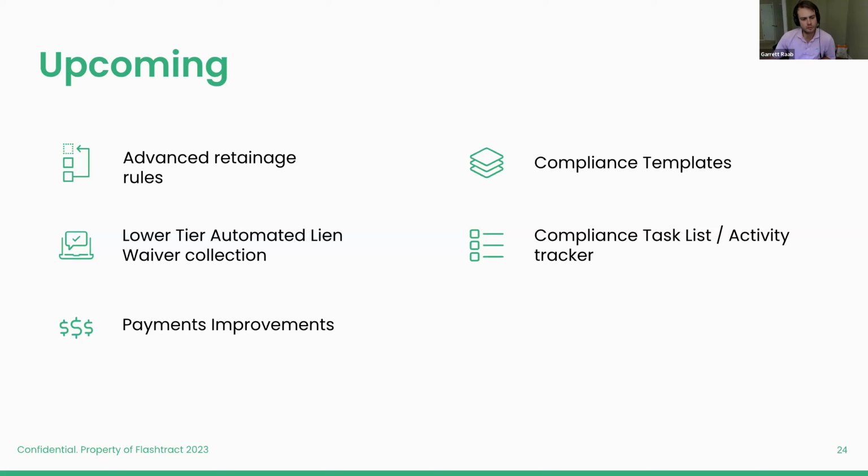So we're building a rule system that would allow you to set up a rule that automatically reduces the retainage rate once a trigger or threshold is met. Again, the common scenario there is maybe it's 50% complete, or maybe it's 5% of retainage held on the contract, but the system would be automatically reducing the rate at that point in time.